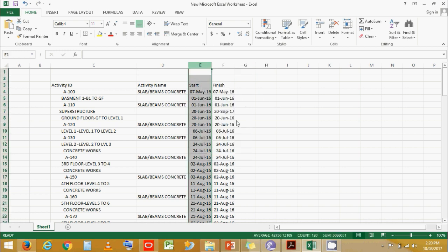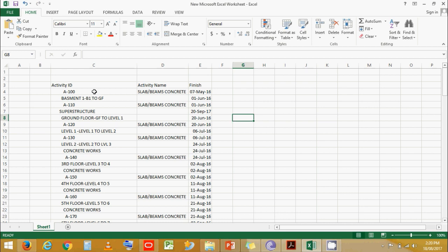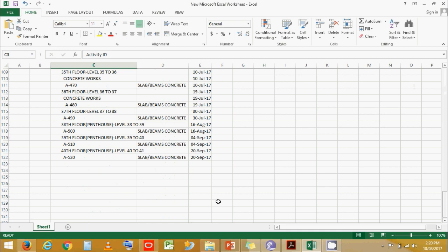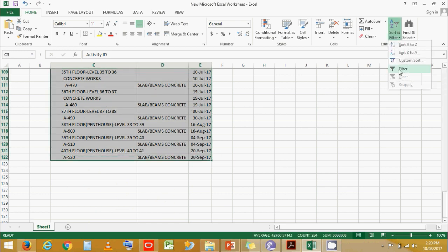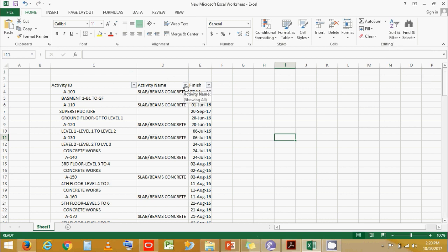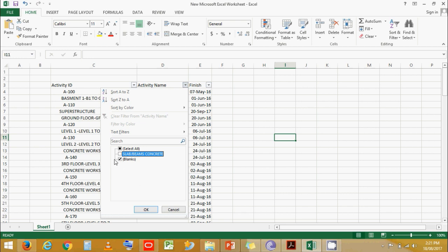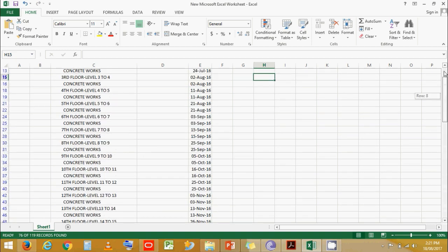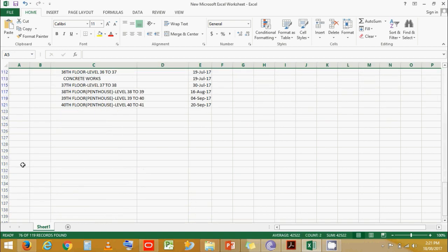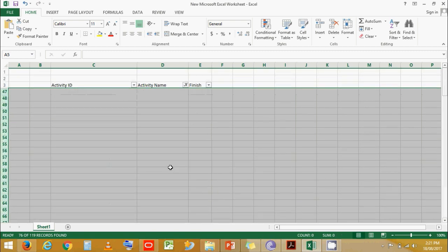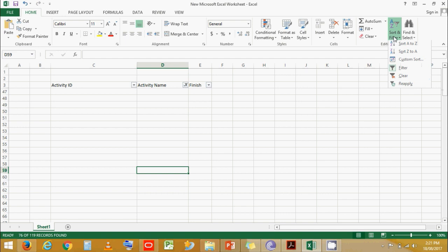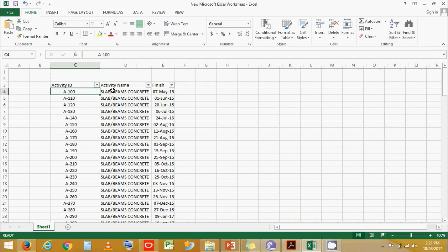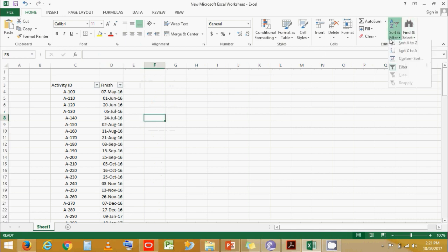We also don't need this start date. Next thing we need to do is select the right area and apply a filter. Now let's untick this and only keep the blanks ticked. Click OK. Now if you see everything is filled out. Let's come down to the bottom and delete this. Now let's clear the filter. Now if you see the only things left are activity ID, slab concrete date, and the finished concrete date. These are the casting dates. We do not need this start date, so we can just delete it.